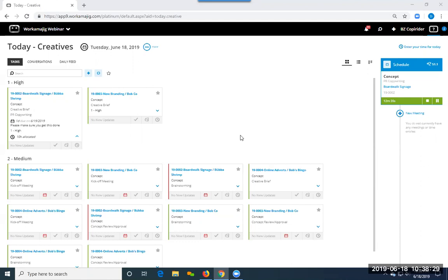And excellent question regarding the task duration. If I change it for a particular person, we did have that where we can have an assignment. Two people are assigned to it, as long as I have track actual separately set on the task, where I can have somebody start and end prior to somebody else within that task. It's still bound by the overall task duration and the start and end dates, right?